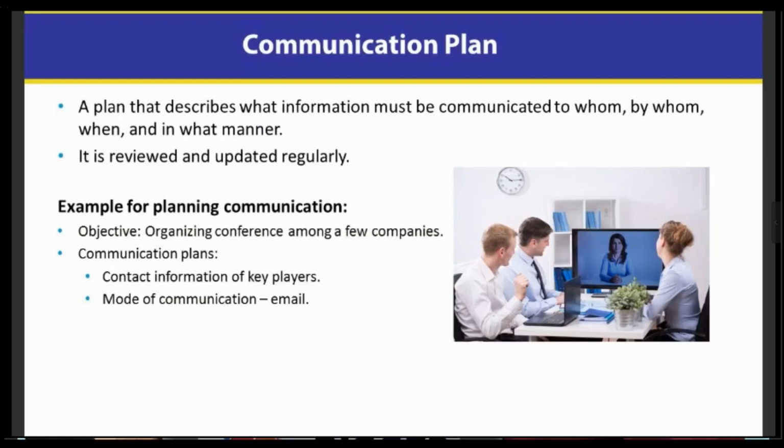For instance, if somebody says, I'm 50% done with my activity, well, the first thing that's going to come out of my mouth is, what does that mean? You've gotten 50% of the work done, and you have another 50%, or you found more to do? You've used 50% of your budget? And you see what I'm saying? It can be scope, time, or cost when we're talking about that 50%. Sure, that makes sense. So, when we sit down, I'll tell people, all right, when you give me information, this is how I need to receive that in order to make sure that our documentation is accurate.